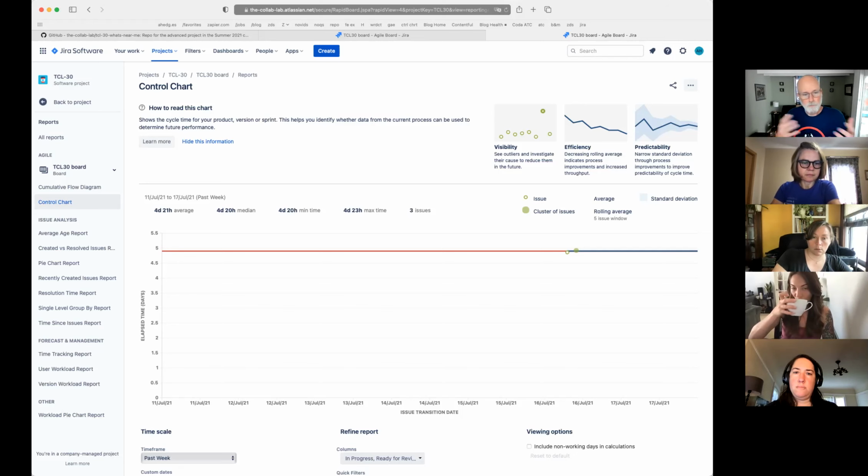A lot of Kanban teams shoot for 3 days as the time between when an issue goes into in progress and when it's actually shipped to users. So that's what we shoot for on Stacy's and my team at Zapier. It's the weekend, I forget where I work.